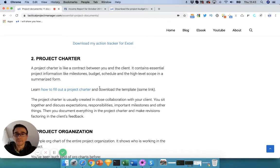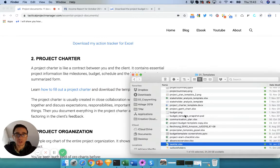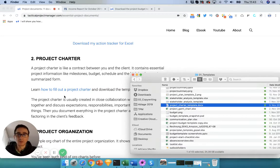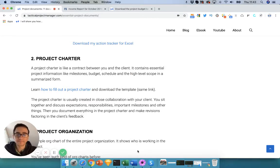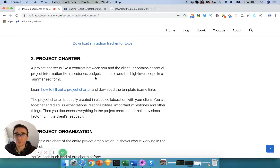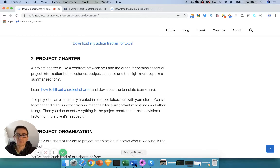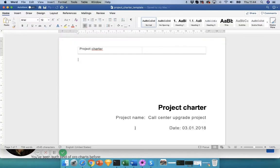The next document is the Project Charter. You can download it via the link provided. A project charter is like a contract — it's a summary of the key decisions, elements, milestones, budget, and responsibilities of the project. Once finalized, you print it out, sign it yourself, and have the client sign it too, so everybody has a common understanding.